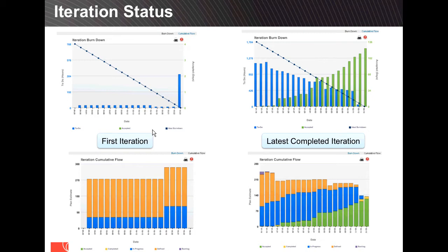Ideally, at the beginning of an iteration, a team is making a commitment. So we've identified these 10 stories for this sprint. We're making a commitment to get these done in the iteration. Tasking helps us increase our confidence about making that commitment. So it works quite well. Generally it is done the first day of the sprint. You might come into a sprint with tasks already defined, or you may continue to add tasks. That's acceptable. People discover things as they work on things.